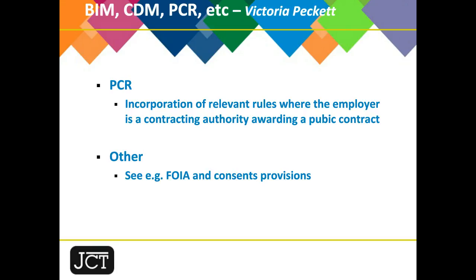Previously, you'll recall that there were quite a few references to consents and approvals that were scattered through the contract and said that they were not to be withheld unreasonably or delayed. That's been rationalised, so if you look at the front end of the terms and conditions of the JCT contracts, it'll be found in Clause 1. Towards the end of Clause 1, you'll find what I'll call an umbrella provision, basically saying that unless provided otherwise, any consent and approval can't be unreasonably withheld or delayed. So just bear in mind that that is there, and it doesn't need to be repeated throughout the contract.